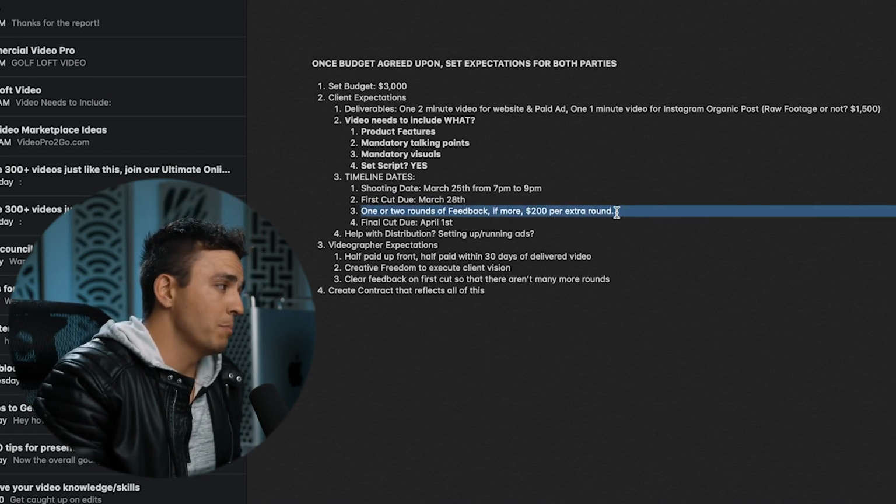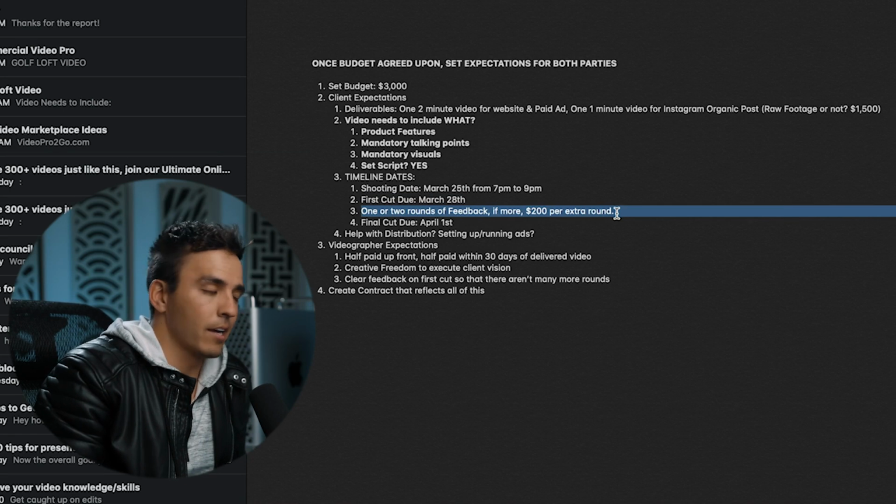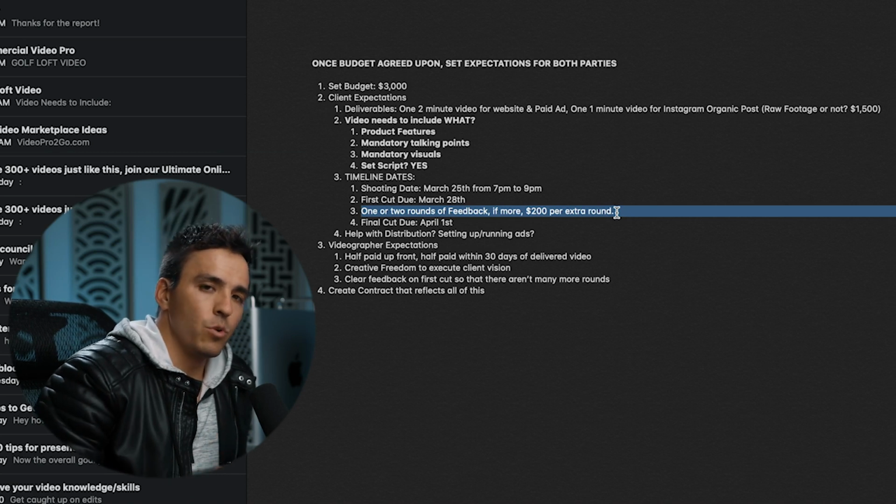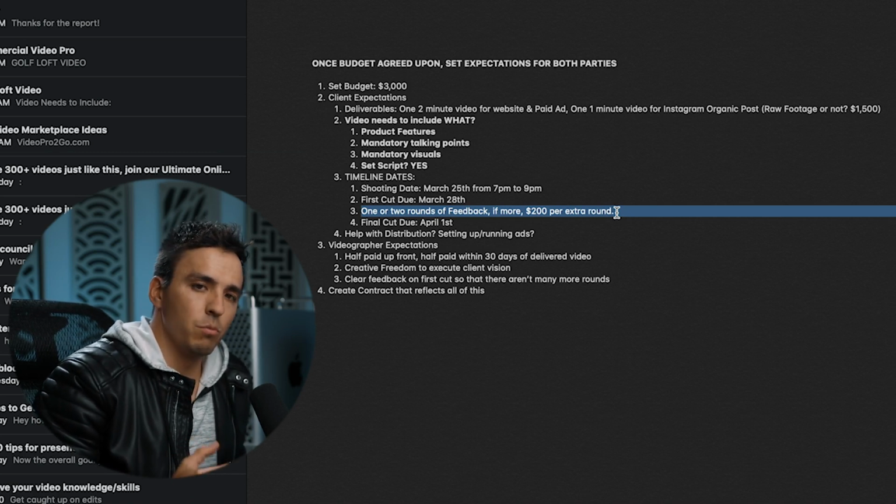Now this is a big one, guys. Specify the rounds of feedback. Typically, I like to do 1 or 2 rounds of feedback. One major round of feedback, and then usually I'll let them do a second round of feedback if it's just a few minor tweaks here and there.